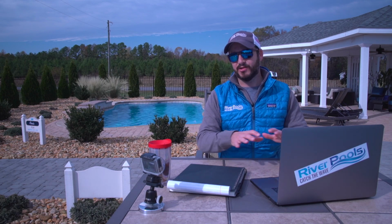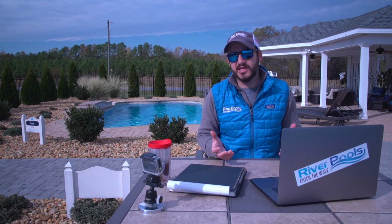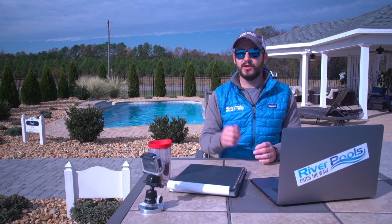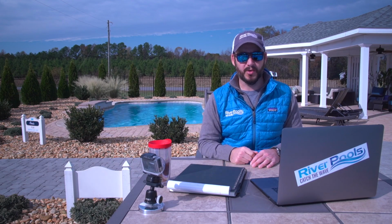Some properties can handle having that dirt spread out in different places, but oftentimes, especially in the suburbs and city areas, that's just not possible, and the dirt needs to be hauled away. Make sure you ask that question and have that conversation up front. Where is the excess dirt going to go on my property? And if my property can't handle it, how much is it going to cost to have it hauled away?